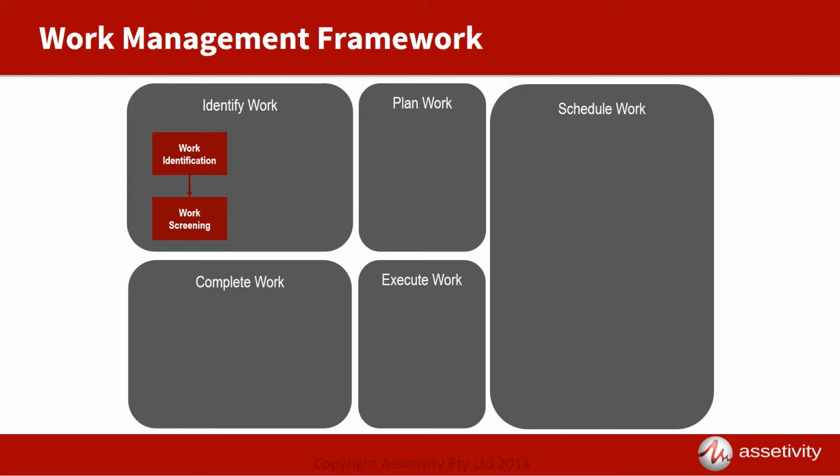Invariably, the resources required to complete the tasking will exceed the resources available on occasions, even after screening. Consequently, our work identification processes finish with a prioritization step that ensures each task is dealt with in an appropriate time frame that is consistent with the risk to the business. This is often achieved through simple business rules, but is fundamentally a risk assessment process.